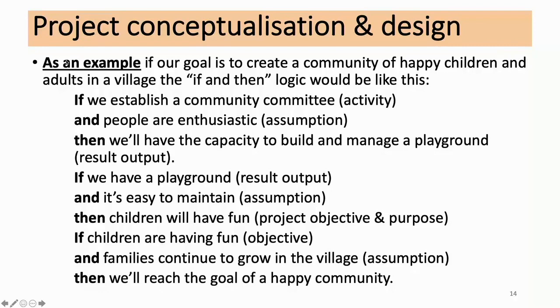If we have a playground, and it's easy to maintain, which is another assumption, then the children will have fun. That is the objective and purpose of the whole project. If the children are having fun, which is the objective we wish to achieve, and the families continue to grow in the village, which is an assumption, then we'll reach the goal of a happy community.